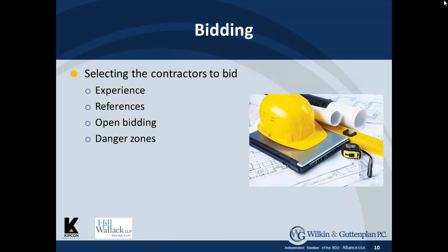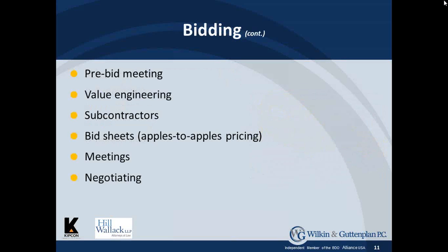The other thing is don't always select a contractor based on low price. Make sure that you meet with the contractor and talk to them to get a comfort level with the work that they do. Also part of the bidding process is a pre-bid meeting where you may go to the community and show the contractors what the work is going to be and allow them to ask any questions.